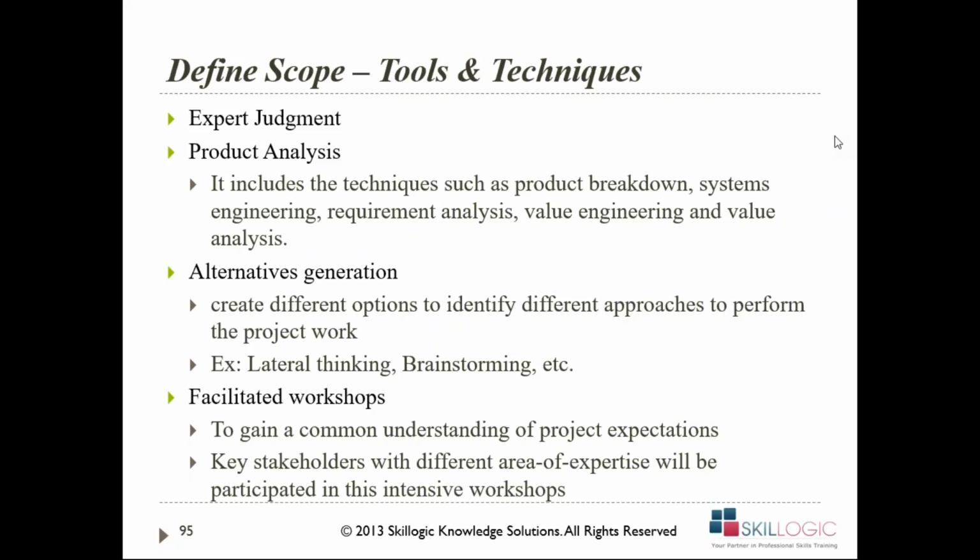Breaking down to the work package level is called the work breakdown structure. The key point here is you have to break it down only to the level of the work package. There is a rule here: the 8/80 rule. The work package should be designed so that it is not more than 8 hours per day, and it should not exceed 80 hours.